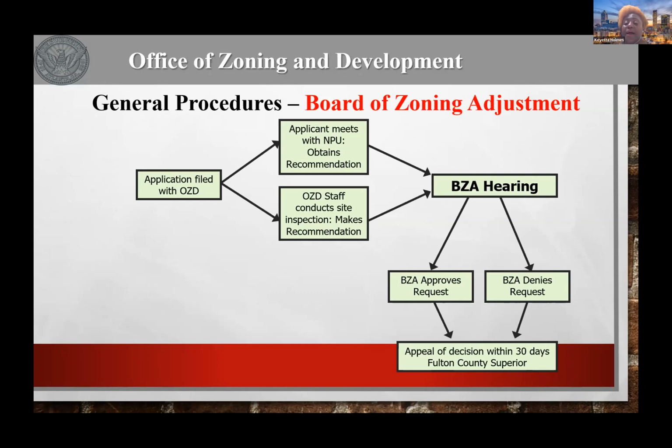and that planner then sends a planner introduction to the applicant, providing information related to the MPU and hearing dates and information that's pertinent to the Board of Zoning Adjustment. Like the Zoning Review Board, if there's a favorable recommendation out of the MPU, then the BZA hearing is set. The BZA hearing dates are also the first and second Thursday of every month. They, however, meet at noon, and that's noon during the day. And once the board hears an application, they make a decision, and that decision is final.